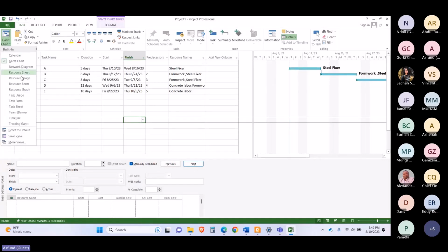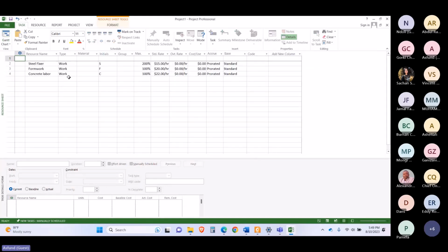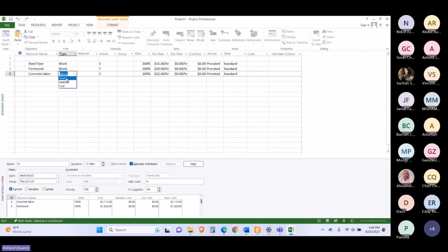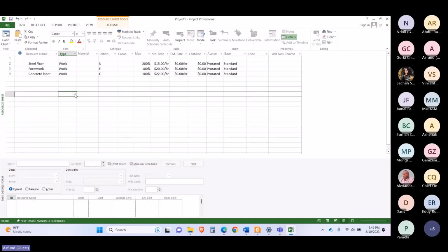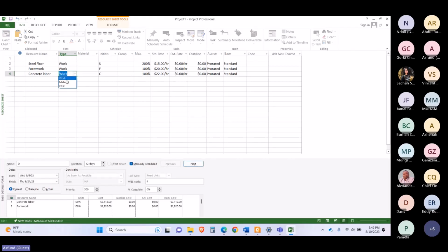And also the important thing is that in Microsoft Project, we can create three types of resources. First one is the work resource, basically the man resource, and also you can create the material resource. For example, there can be concrete or aggregate or cement, etc. And also you can assign a lump sum cost by using this option, but it isn't preferable because by using this we cannot perform the EVA analysis efficiently on a particular schedule. So it isn't recommended. It is recommended to use the work resource or the material resource.